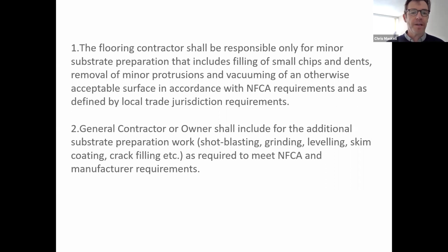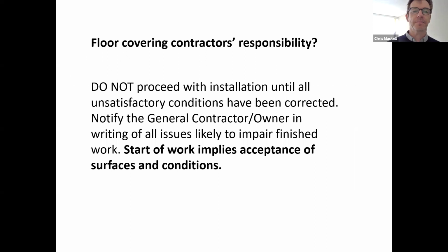Point number 2 here, for example: general contractor or owner shall include for the additional substrate preparation work, all additional substrate prep work: shot blasting, grinding, leveling, skim coating, crack filling. This helps to separate responsibility for the flooring contractor and the general contractor and stop a lot of fights during late stage construction.